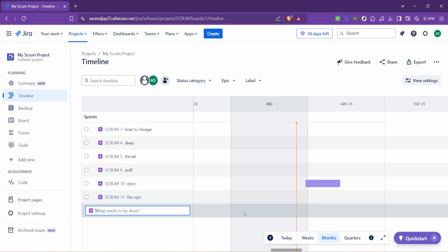The final, and perhaps most interactive step, is setting the start and end dates for your epic. This involves a bit of drag and drop. Move your mouse over the empty cells within the timeline, corresponding to dates. Select the date you wish the epic to start, and in similar fashion, pick an end date. This sets a scheduled period for the epic, visually represented on the timeline, allowing for an at-a-glance view of your project's framework and deadlines. A few tips to enhance your timeline management.